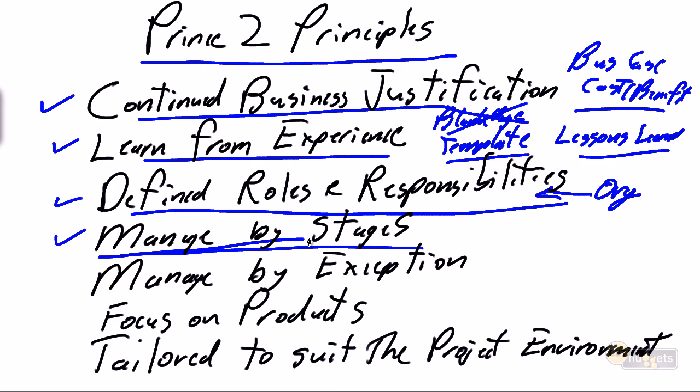And a key message of managing by stages is it is good to cancel a project that no longer makes organizational sense. The business case may have changed, the cost may have changed, the benefit statement may have changed, but it's far better to cancel that project at whatever stage we're in as opposed to investing more money into it. So continual rejustification and management by stage.